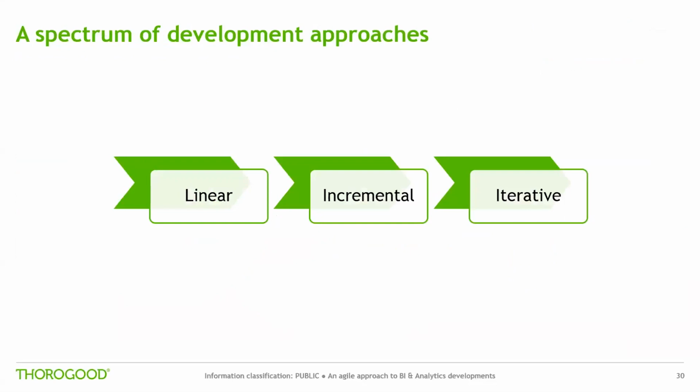Conversely, those in favor of a traditional waterfall approach may discount Scrum and Agile because of its preference to use full-time resources and co-location and a lack of planning. But these rules can be relaxed if an alternative, less pure approach to Agile is taken, allowing for an initial, more thorough planning phase using geographically dispersed teams who also have other responsibilities, so not utilized full-time.